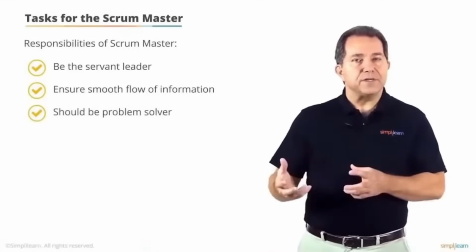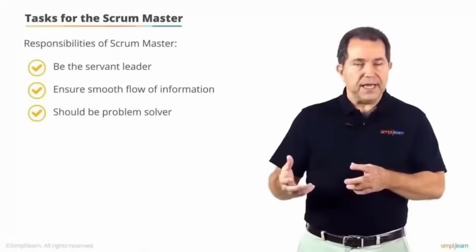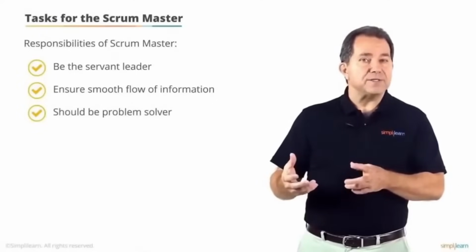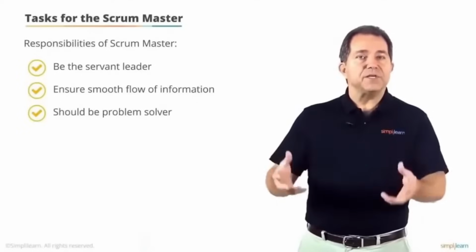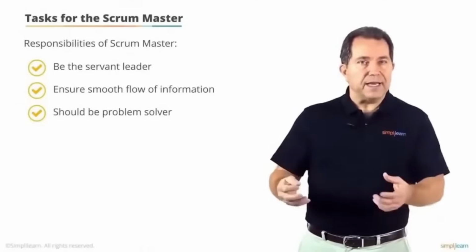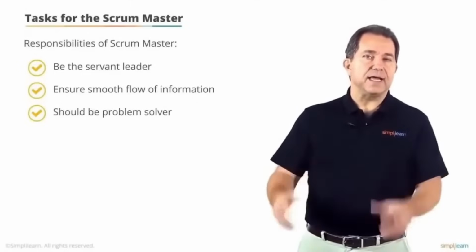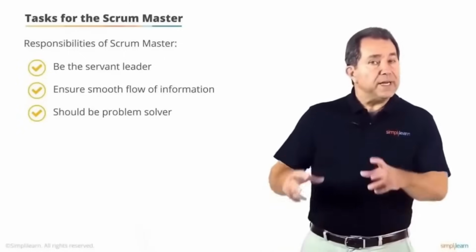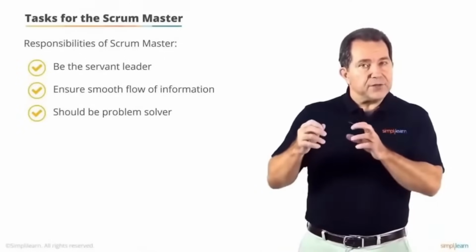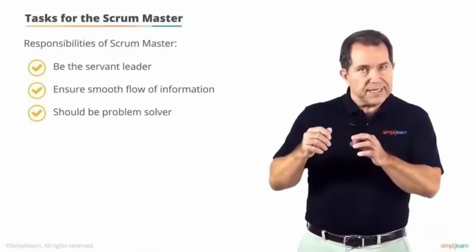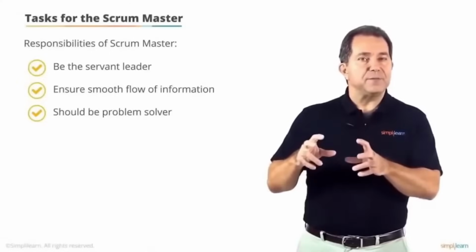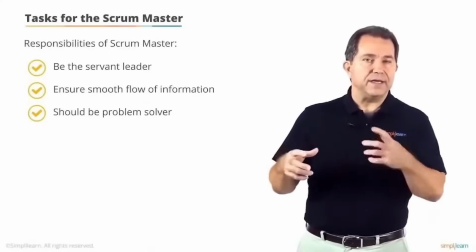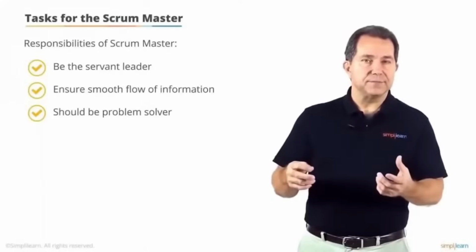It doesn't matter what the nature of the issue is, a Scrum Master needs to mobilize the right resources within the organization to resolve those issues in a timely manner and escalate promptly if that does not happen. We need to understand that in the short duration of a sprint, even a few hours of being stuck can make the difference between a successful and unsuccessful sprint.